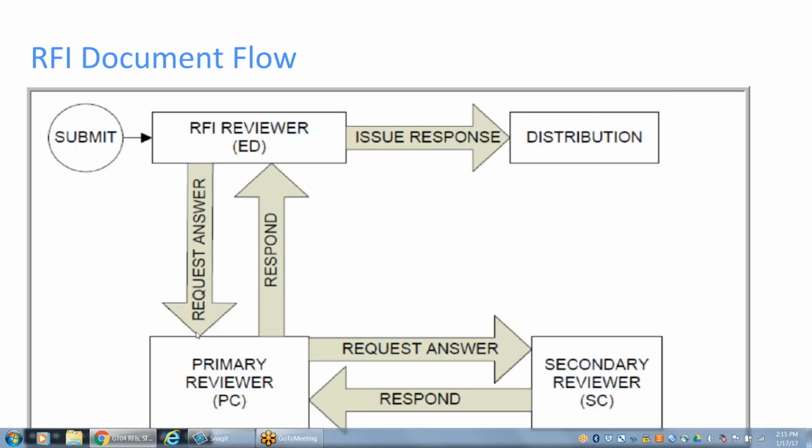You go in and on their behalf record what they've said, maybe scan their email and then upload the file onto the RFI. Depending on the response, if you're not satisfied, we can further request an answer. If it's ambiguous and you still think they haven't really answered it, you can request an answer again, and it goes back into their ball and court, into their activities. So you can have it open.